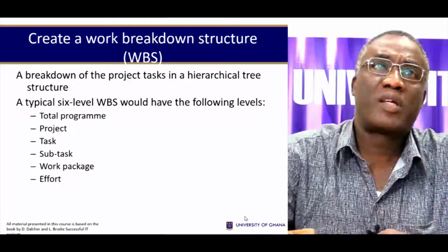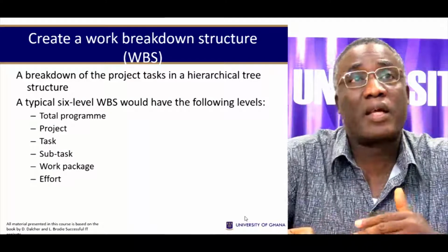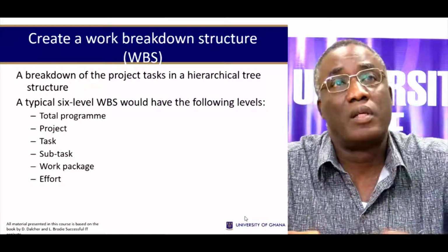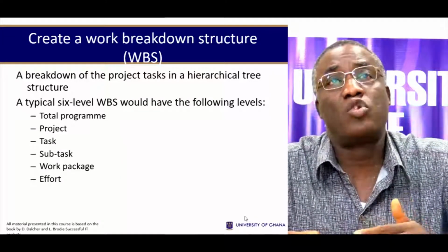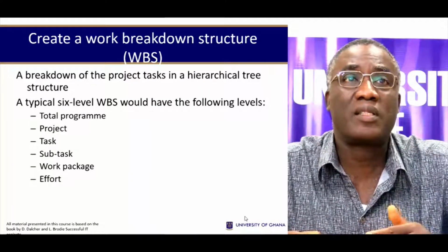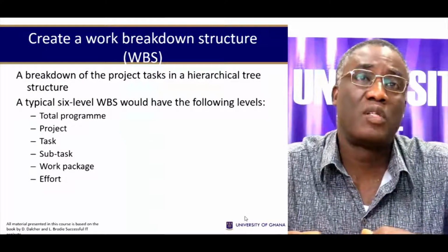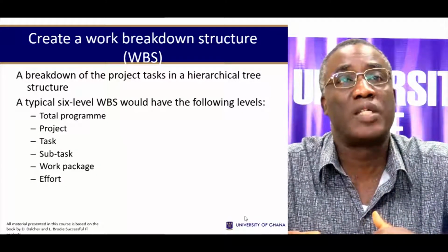So a work breakdown structure is a breakdown of the project task in a hierarchical tree structure. Typically, you would use a 6-level WBS, to have the total program, the project, task, subtask, work package, and then effort. This is what will be included in your WBS.